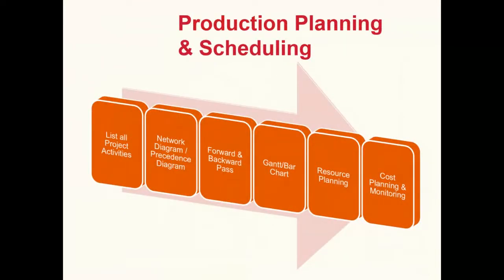Starting with the basic activities at the beginning of a project: listing all key project activities, then developing network diagrams or precedence diagrams to identify logical relationships between different activities and their precedence relationships. Once that is done, we do a forward pass and a backward pass. The forward pass helps calculate early start times and the backward pass calculates late start times — critical information when planning resources, especially in constrained environments.